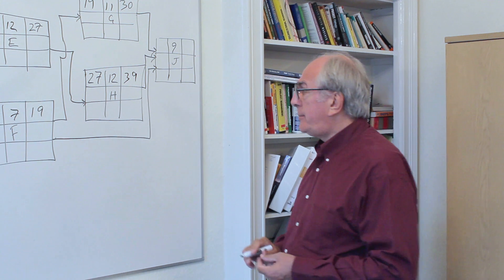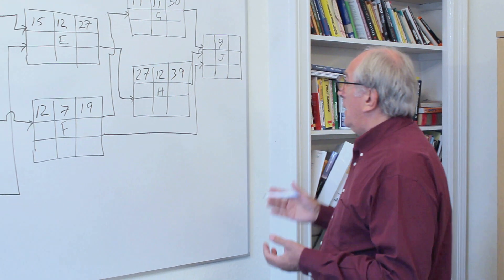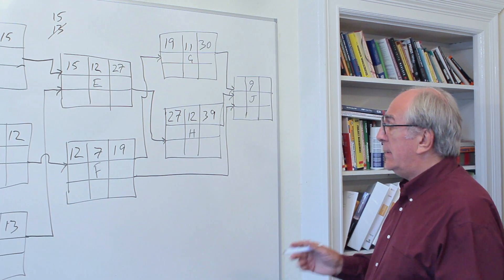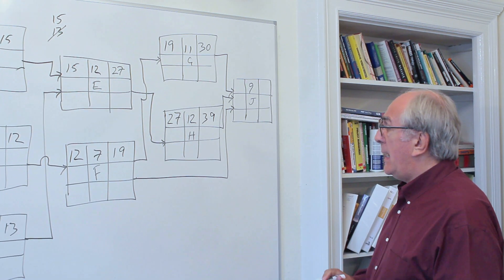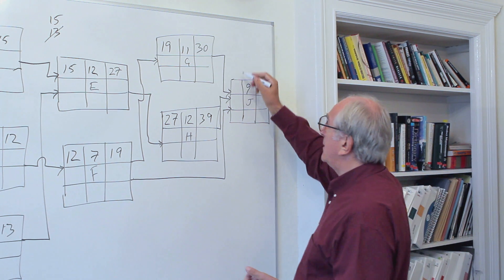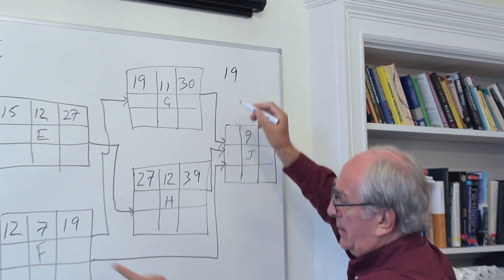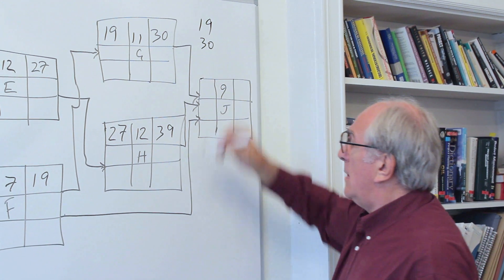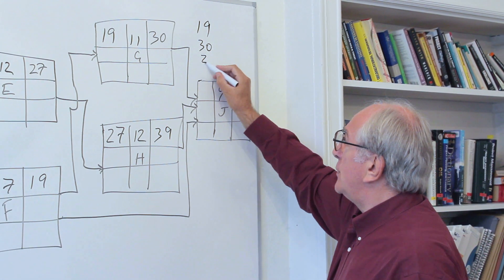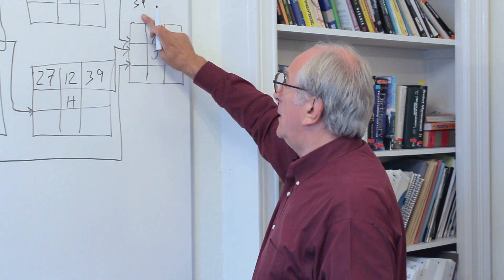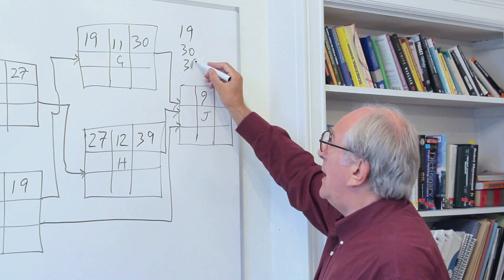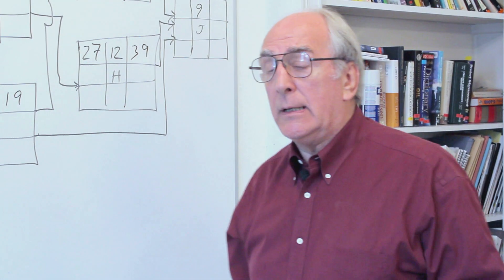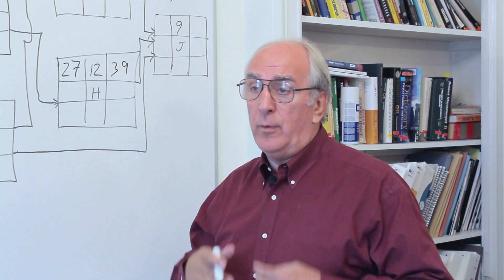For activity J, the start of activity J is constrained by three activities: F, G, and H. So that means our choices are 19, the late finish of F, 30, the late finish of G, or 39, the late finish of H. That example that we used earlier was when we had a choice we took the maximum.